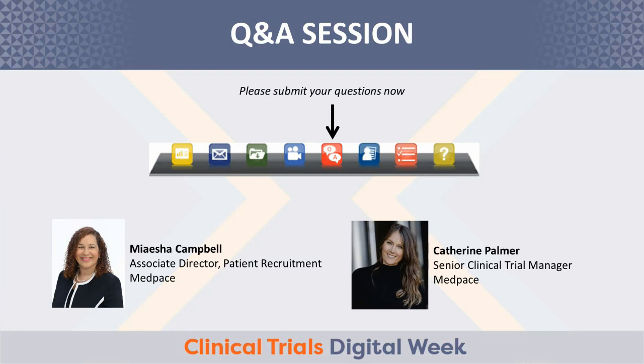barriers to recruitment. In addition, following award of each study, the CTM will conduct a feasibility assessment with potential sites to understand their potential issues from a site perspective. The information is collated and recommendations are made to the sponsor as appropriate to consider design revisions. In addition, Medpace will develop a risk management plan to conduct the risks and develop mitigations and contingencies to address